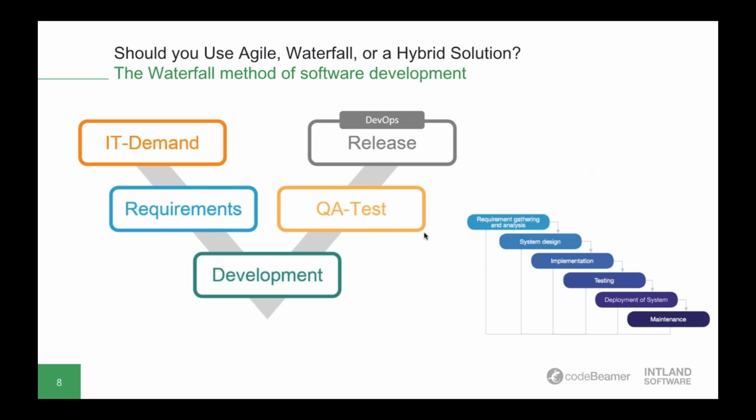Right, so let's first look at waterfall. As mentioned before, waterfall is a somewhat rigid, sequential, and linear method of development. It places importance on quality assurance with testing and these QA activities carried out at certain stages of the process, but especially towards the end of the development lifecycle. And Waterfall offers limited flexibility in reacting to changes. So if you wanted to update the product's specifications, you basically have to start all over again.